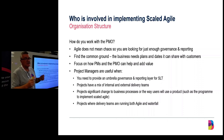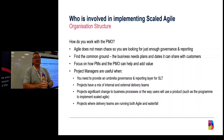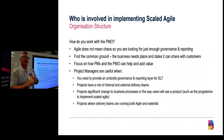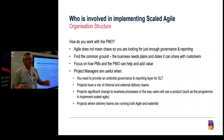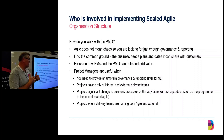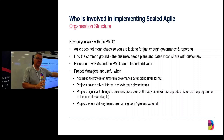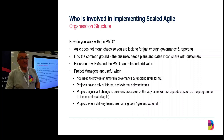If you've got a mix of internal and external providers, you can't go to an external provider and say 'we want you in our daily stand-ups, following our scrum cadence' — it doesn't happen. Parts of your delivery will be more traditional, more waterfall, and you need PMs to manage those bits because agile doesn't cover them. There are lots of situations — strategic deadlines, legal governance, hard targets — where having a PM chasing teams and managing that is very useful. So bring PMs aboard. You probably don't need as many as you've got today, but you will need them.